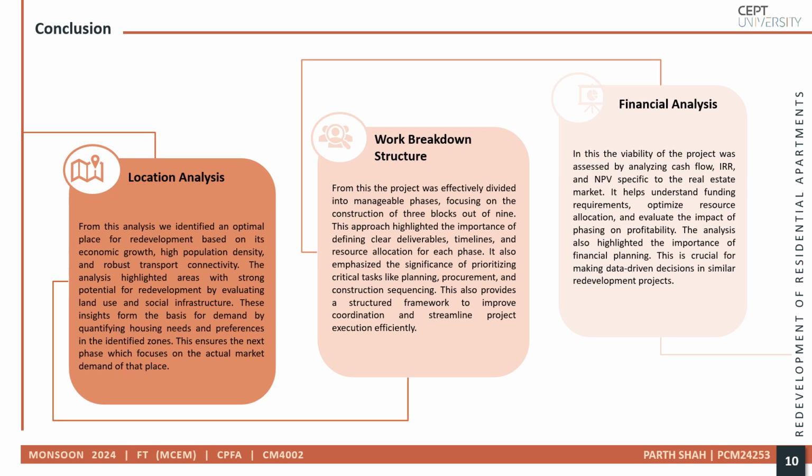From the work breakdown structure, we concluded that dividing the project into manageable phases, starting with the construction of 3 blocks out of 9, helps define clear deliverables, timelines, and resource allocations for each phase. The structured approach emphasizes the importance of critical tasks like planning, procurement, and construction sequencing, improving coordination, and streamlining project